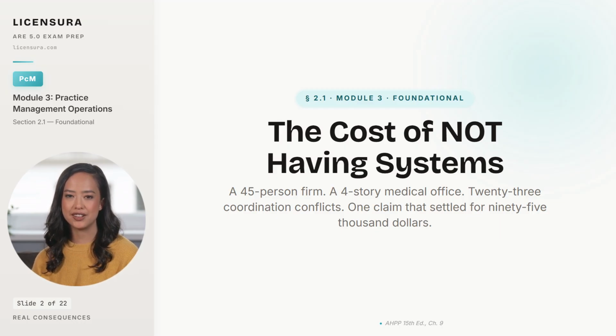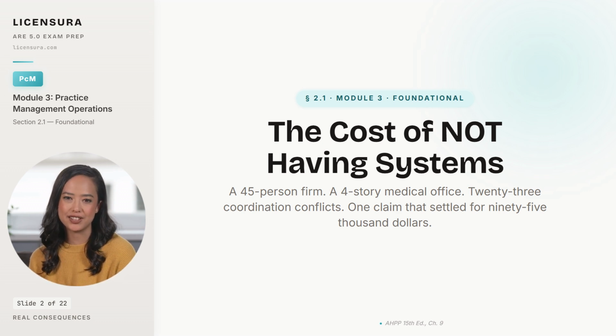The total direct cost came to $168,000, plus a 6-week schedule delay, a furious owner, and a claim that eventually settled for $95,000. The root cause was not bad design talent. The root cause was no BIM coordination, no clash detection, and no systematic review process. The mechanical engineer drew ductwork looking at 2-dimensional structural plans, and the vertical conflicts were simply invisible. Hold that number in your head, 168 in correction, and weigh what prevention would have cost.